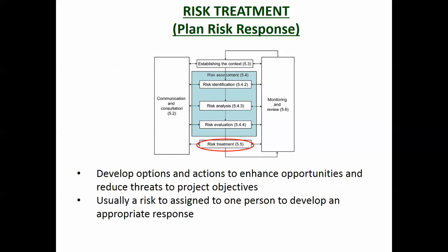And then you go through again and say, well, if someone's wearing a high-vis jacket and they're properly trained, then the chances of it happening are probably reduced down to unlikely. So is that an acceptable risk or not? That's what you're doing in risk treatment: you're looking at those risks and trying to reduce the chance of them happening. And what you end up with is a to-do list. These are the things that need to happen on site.